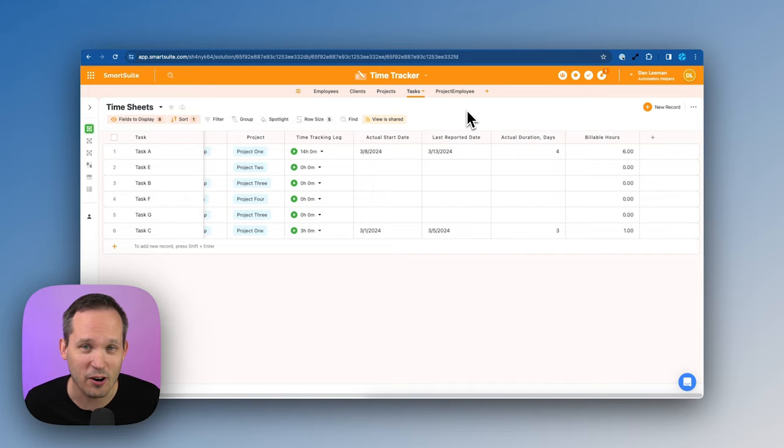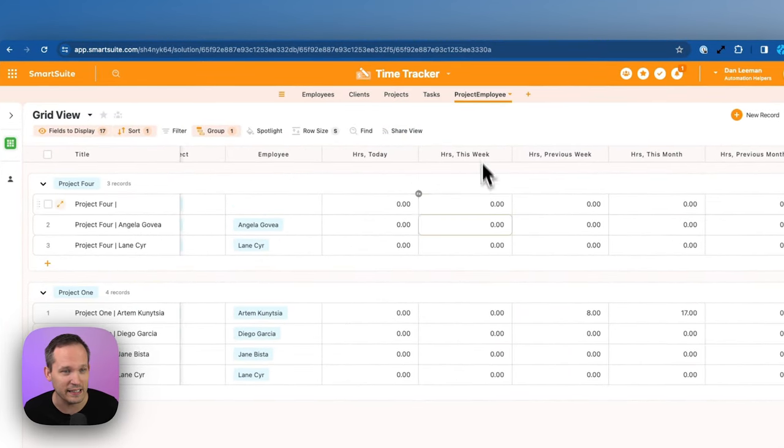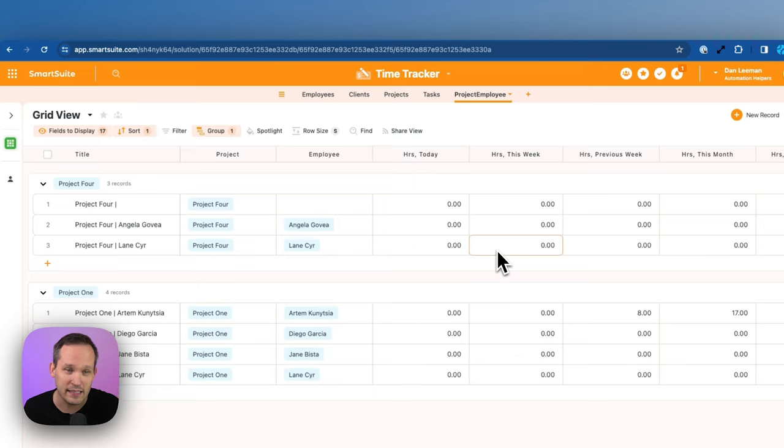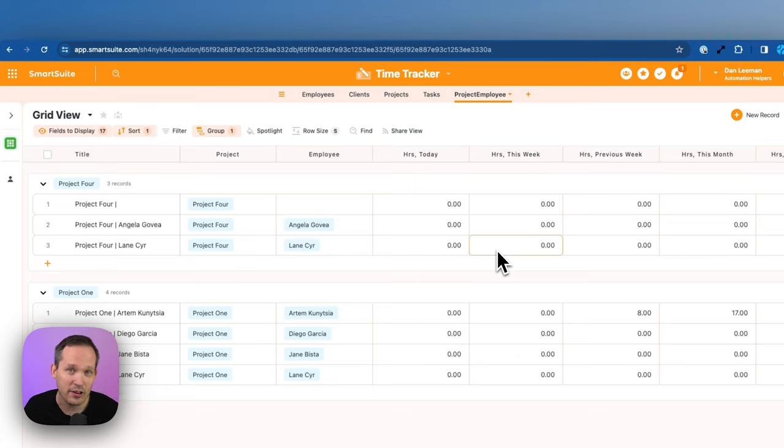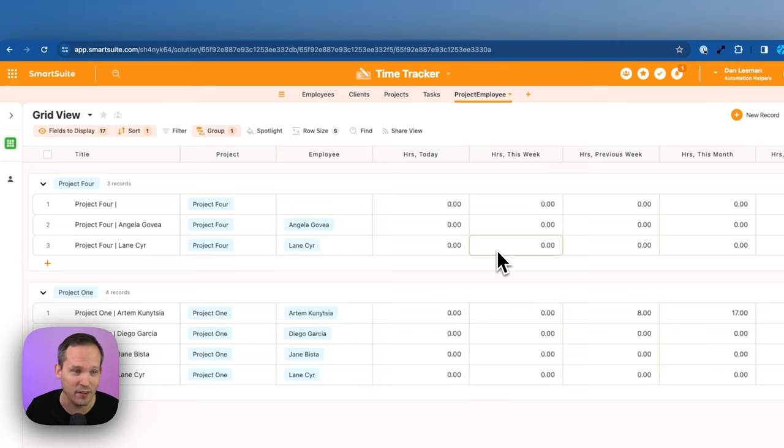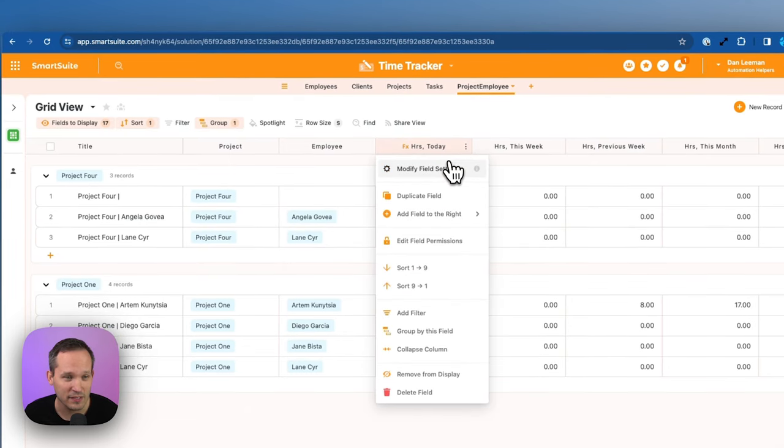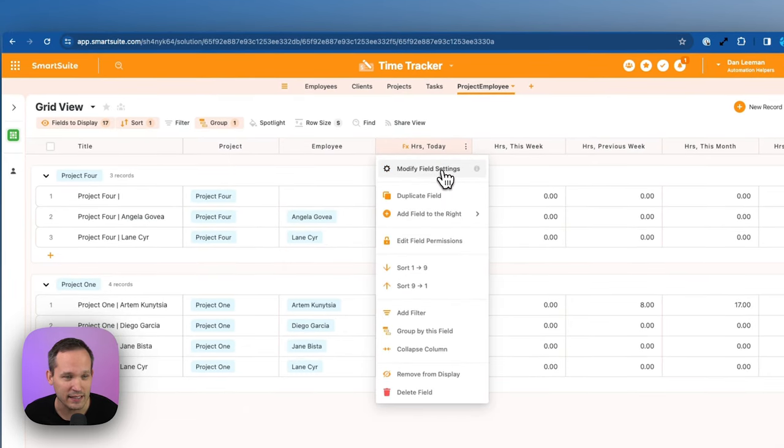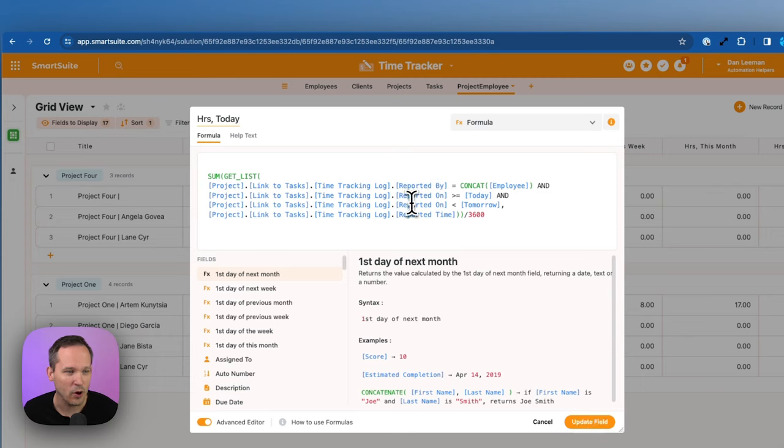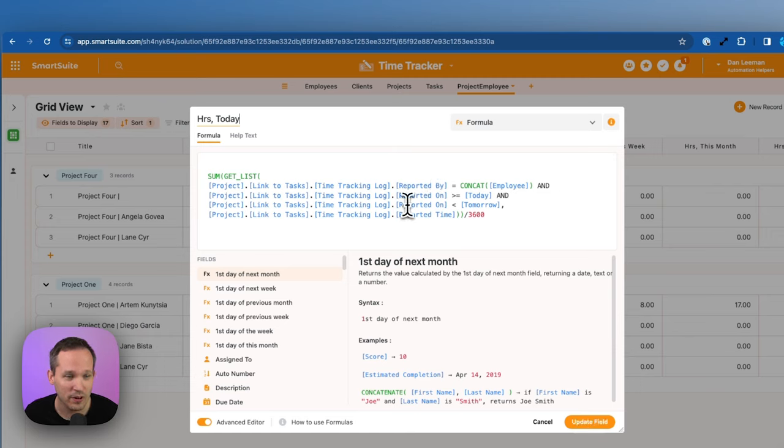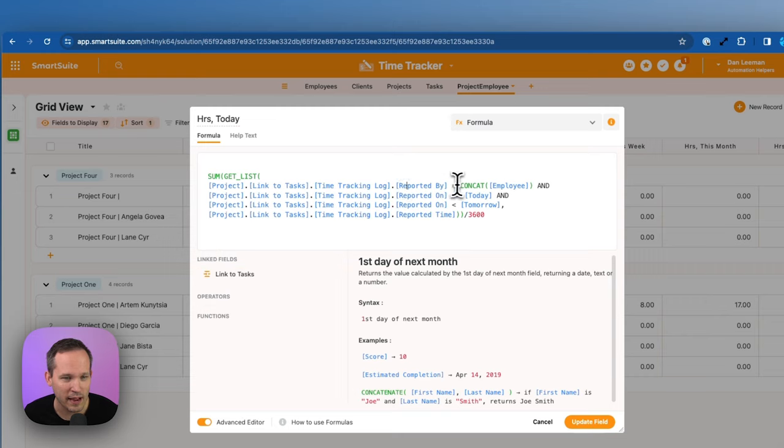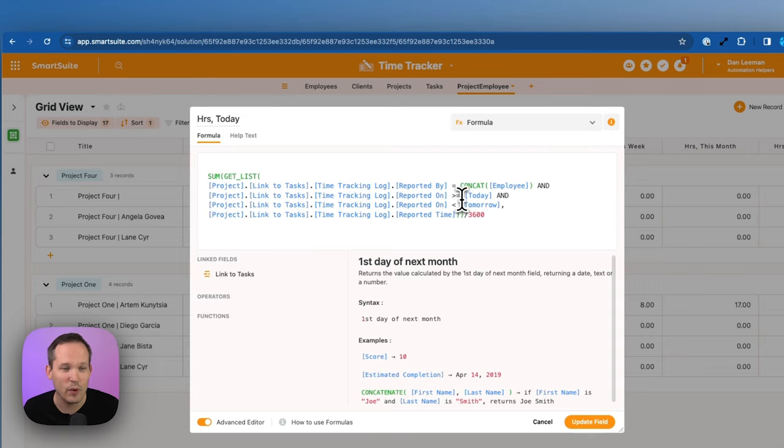So a huge shout out to Artem from SmartSuite, who put together some really powerful examples. So if you were logging time on the tasks, just individual tasks and putting in your time entry there, now we could have a table that's actually tracking summaries of all of this. So we can see, here's our project, here's an individual employee on that project. Now we could have a field to say, how many hours are they tracking today? If we open up this formula here, we can use our new functionality of get list. And what we're doing is we're actually using the time tracking log, and we can use that reported by to say, okay, if this matches that employee, then we want to report on the amount of time that they did today. So there's a lot of different use cases for this. I'm really excited to use it internally at Automation Helpers, since we're delivering on projects for our clients, we're doing time entry, and this now gives us a much better way to report.